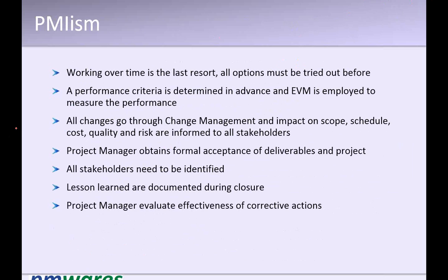All stakeholders need to be identified. Lessons learned are documented during closure. Basically, this is not right. Lessons learned are documented throughout the project, but consolidated in the closure. So it is not just documented at closure. You will forget what happened in the initiation. So lessons learned are documented throughout the project whenever you face any problem, but they are consolidated during the closure. Whatever corrective or preventive measures project managers take, they keep evaluating the effectiveness and make corrective measures.